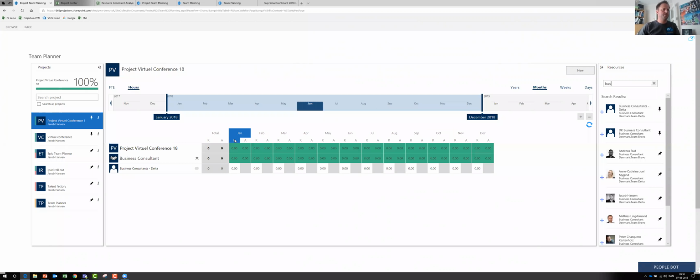On my screen, I see two columns: the request column and the allocation column. The request column is for the project manager, and the allocation is for the line manager. Now we are working in traditional mode. That means I could put in 20 hours of request. I could drag the value, like you do in Excel, and everything becomes red. Red means you have an issue, and the issue right now is that you have nothing allocated.